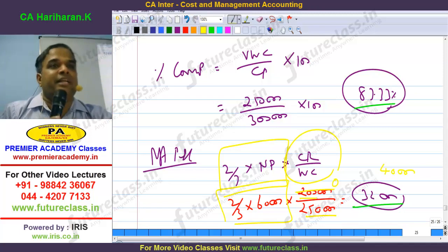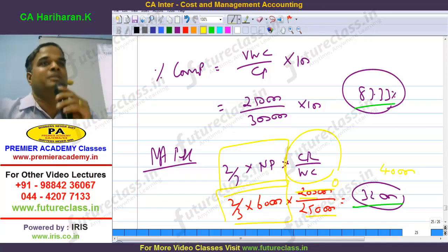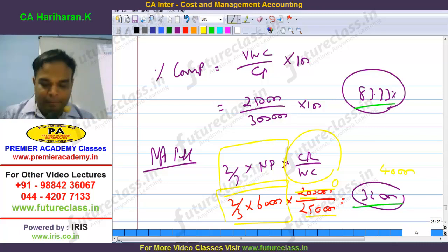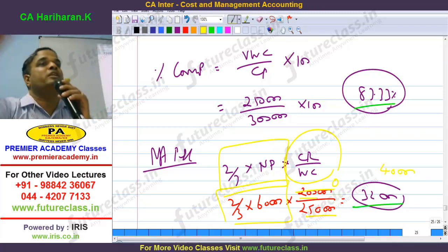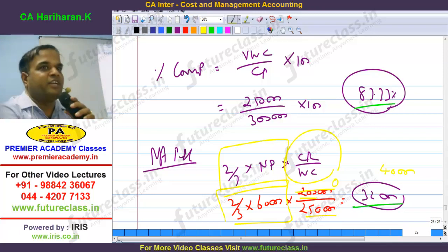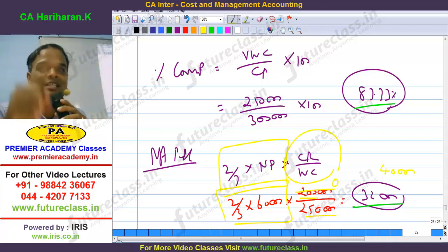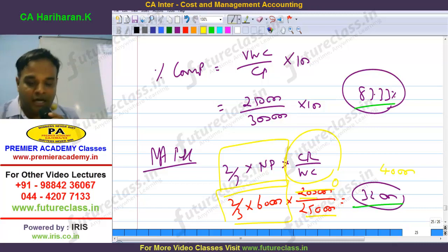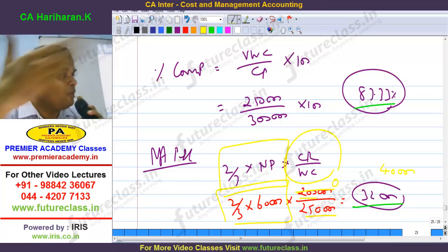Contractee not at all given the money. Then it is a government contractor, and the money will come only next month. Then zero. Then 40,000, 0 divided by 250, 40, only zero will come. I can't enjoy because where is the money to enjoy? In the books profit is there, but I don't have real cash. That's the reason work certified by contract value or cash issued by work certified.